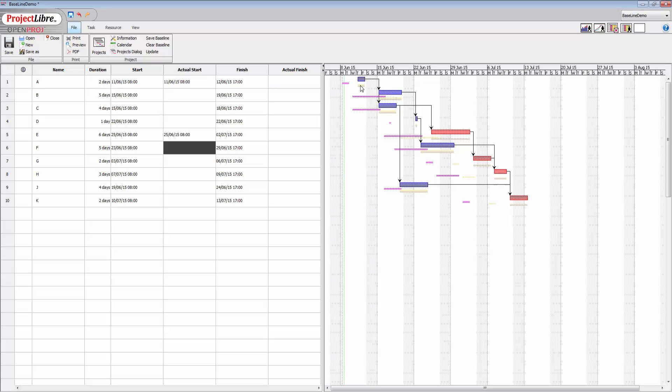And now we can start to see the difference between baseline 2 and 3 is nothing, you can see there. And then we see the changes as they're happening here. So this particular activity has been pushed out by quite a bit.